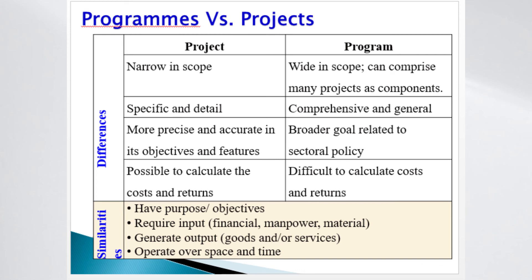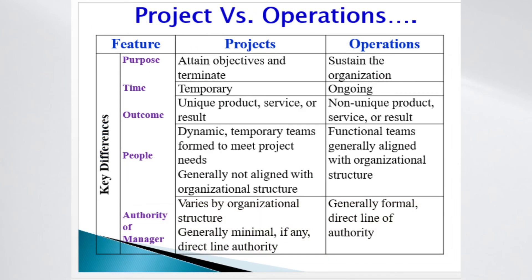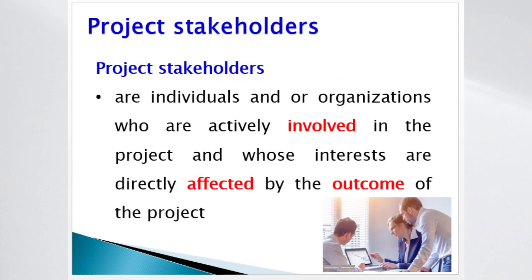Let us see the difference between project and operation. Organizations perform two types of work: project work and operational work. The purpose of a project is to attain objectives and terminate, but the objective of operations is to sustain the organization. The lifetime of projects is temporary, but the time of operations is ongoing. Projects produce unique products, services, or results, while the output of operations is non-unique. Projects have dynamic and temporary teams, but operations have functional and permanent teams. The authority of projects varies by organizational structure, but operations have a direct and formal line of authority.